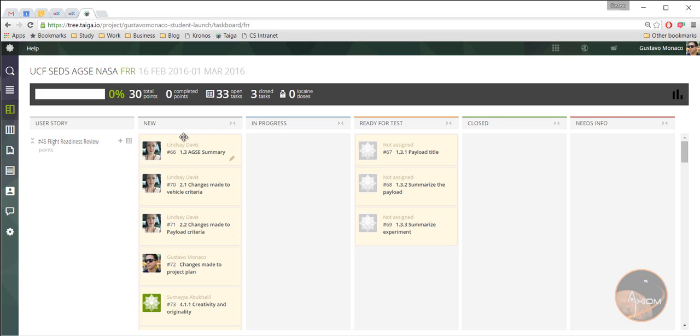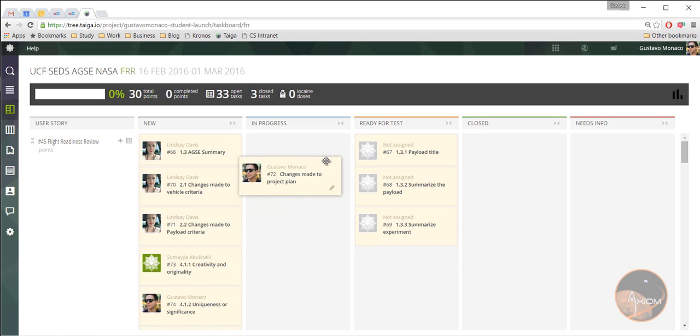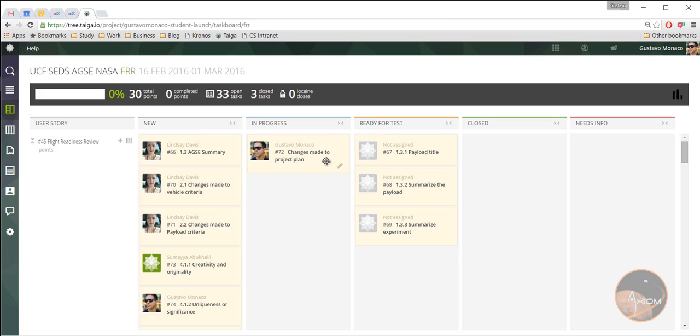But in this case, for example, let's say that you're going to start working on something. Let's say I'm going to start working on changes made to project plan. So I'm going to grab it from here. Before I start, I'm going to put it right here. That is in progress, just so that you guys know that I'm working on it at this moment. Please don't have four different tasks in progress, because that doesn't happen. You do one at a time, you can't do all of them at the same time.